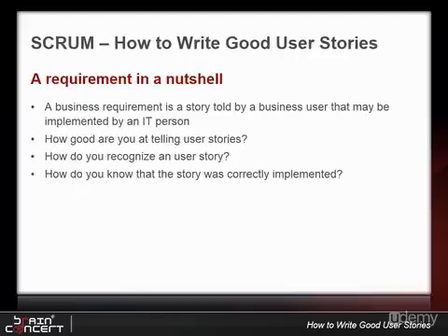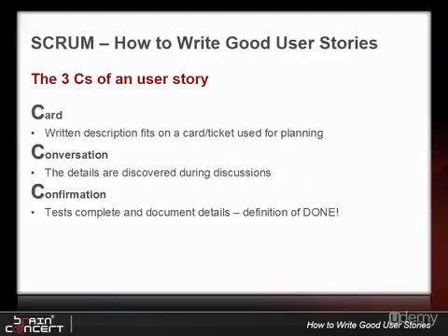A business requirement becomes a user story when the user story is small, fits on a card, is comprehensible by everyone, has the right size for planning, and encourages participatory design. User story descriptions are traditionally handwritten on paper note cards and have these three Cs: card, conversation, and confirmation properties. Let me give you some samples regarding user stories. A user can search an application by the following criteria. A user can be authenticated with Facebook API or by a registration process.